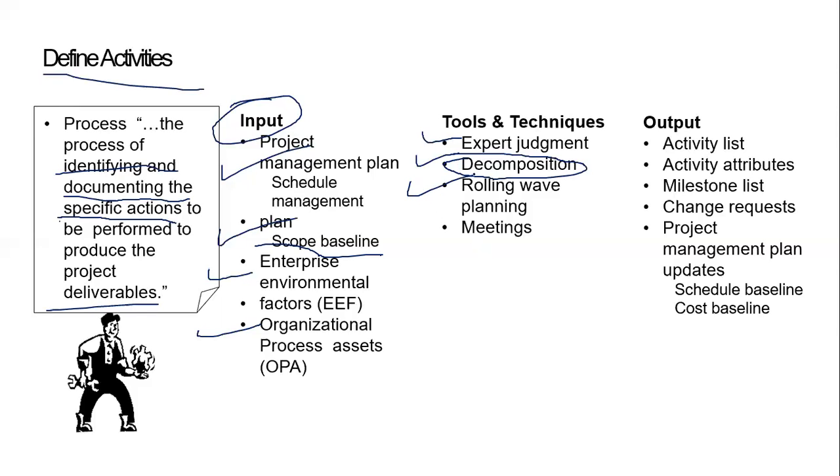Then rolling wave planning, which I think we talked about at length. There is also something called sprint planning. Whenever a sprint is starting, it's typically 3 to 4 hours of activity. It's pretty extensive. You will go with an estimation: is it really going to finish or not? If it is, then what are the impediments? What are the risks? All that will be part of rolling wave planning. And then collaboration has to be there everywhere, and that's where meetings come into the picture.